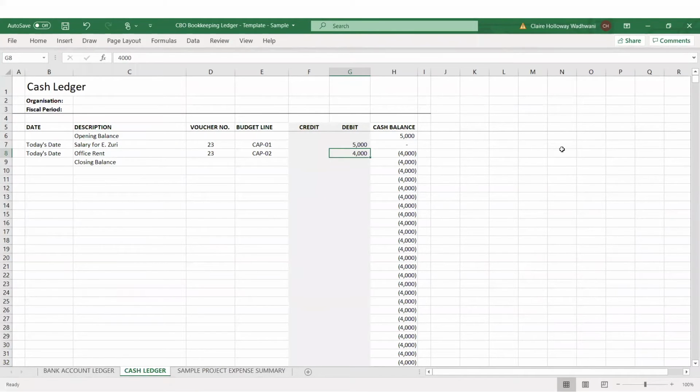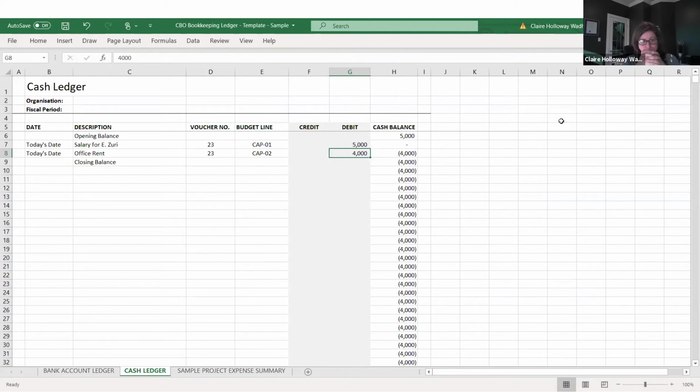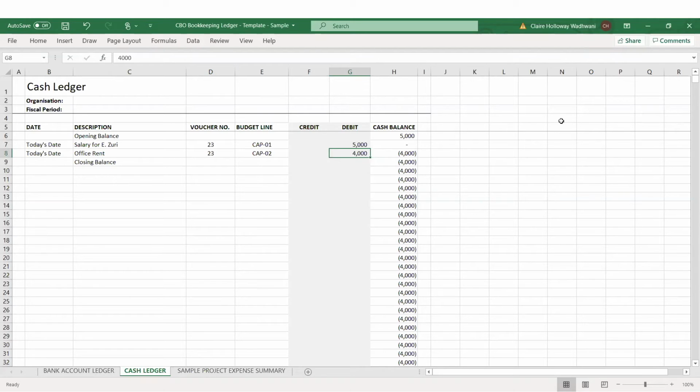And I think the beauty with all this is that it helps us monitor our budget and also work against the timeline, because some projects have a specific timeline. So you could see, maybe when you're already at 50% of your time, you ask, how are we doing with the spending? If you find that you're on track with the spending, well and good. If you find that you have not spent as expected, then that would be the time to really revisit your budget and revise it according to the reality that suits the project time frame.